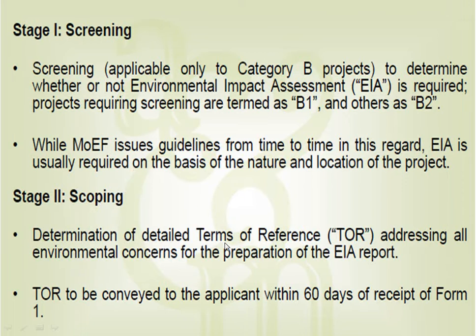Determination of detailed terms of reference. So after that, scoping, terms of reference. Here you have to address all the environmental concerns in the preparation. That scope has to be presented. It is referred to the applicant within 16 days of receiving Form 1. The 60 days you have to do that.